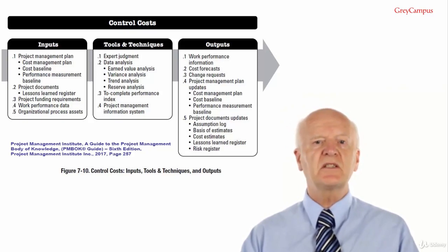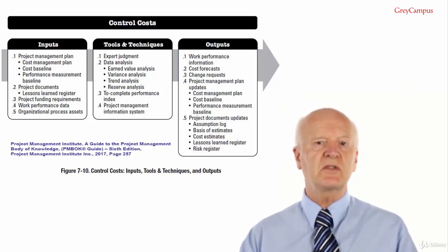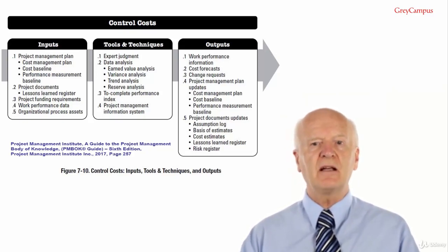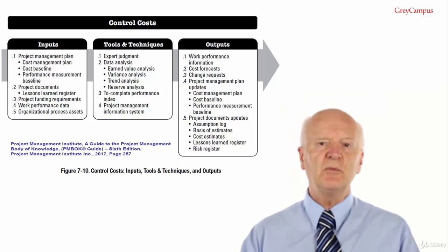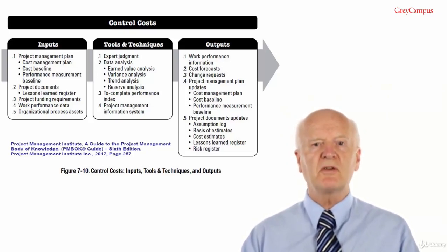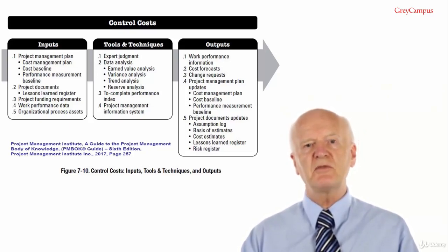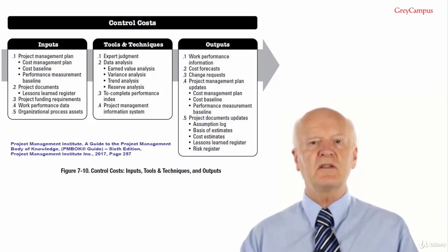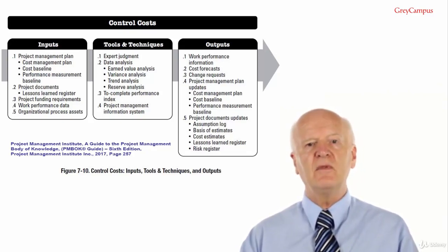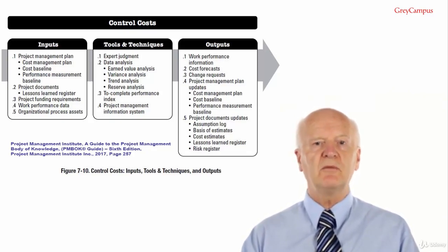Cost Performance Index is a measure of the cost efficiency of budgeted resources expressed as a ratio of the earned value to the actual cost. Please note that CPI is considered the most critical earned value analysis metric and measures the cost efficiency of the work completed. A CPI of less than 1 indicates a cost overrun for the work completed.